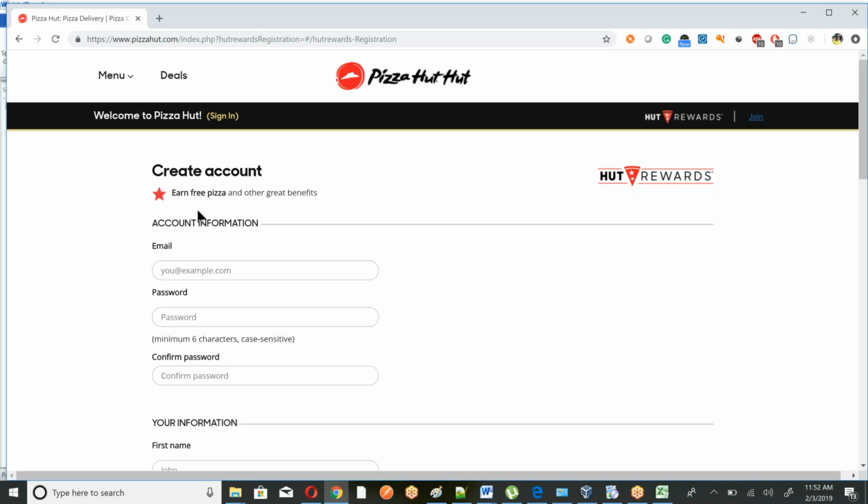So when they create a user history, they discuss it with the developer. It is not his own decision. The BA also works with the developer and the team and asks, okay, I have this user history, how many points do we need to put there? He or she might say this is 5 points.